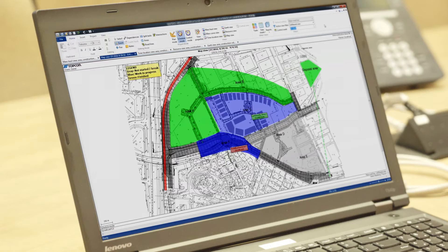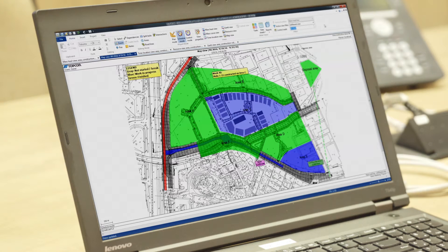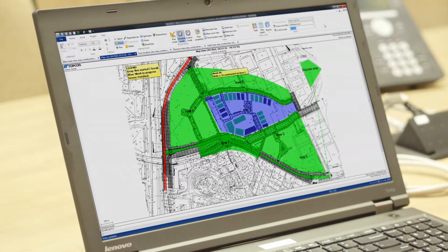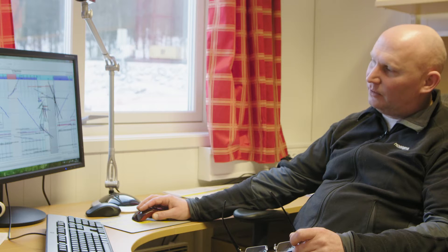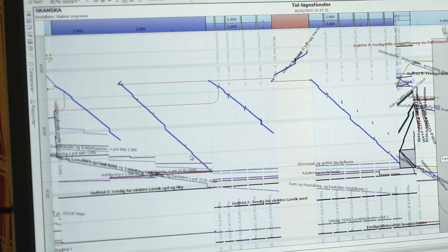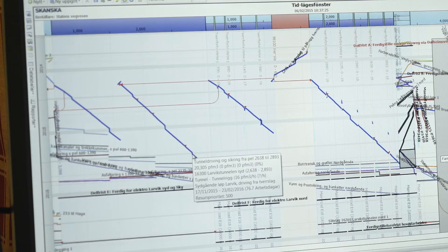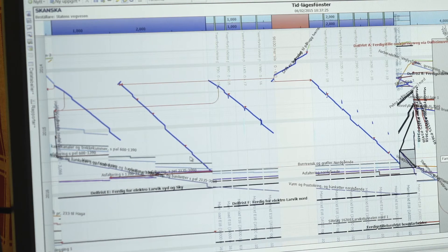In this view, you can go through weekly and see what work is being done and at what stage it's at. We can update it with actual production and we can see that taking out this tunnel here goes over to 2016. But because we can optimize our capacity with the use of Dynarode, we will be finished already at New Year 2016.